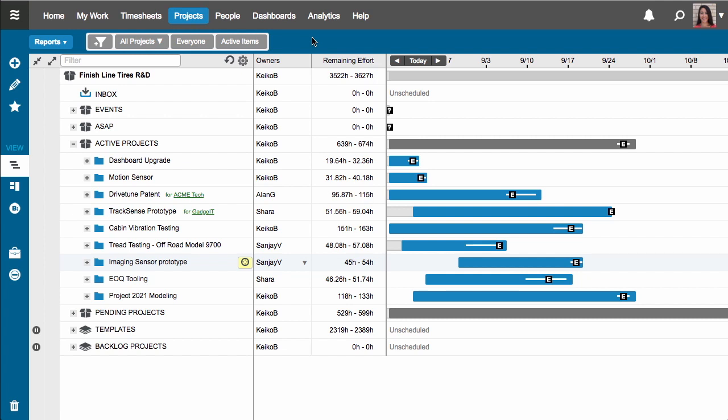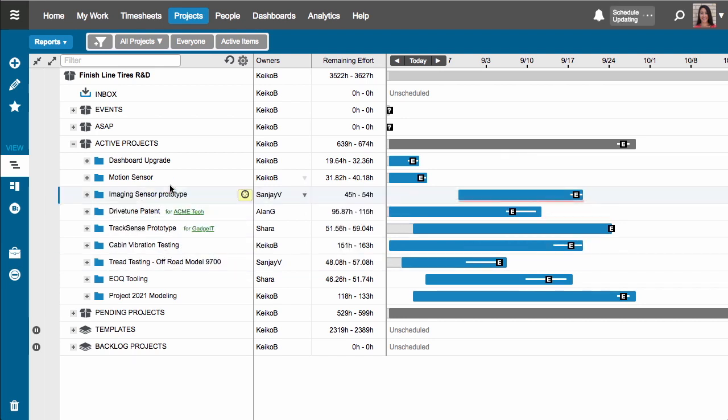Your work is prioritized from top to bottom, so your highest priority initiatives are placed higher in the plan. Then, based on the priority order you've established here, LiquidPlanner calculates a realistic schedule for you. That's predictive project management. When priorities change, you can easily adjust the plan, and LiquidPlanner automatically recalculates the changes to your schedule. So that's an overview of the Projects tab.